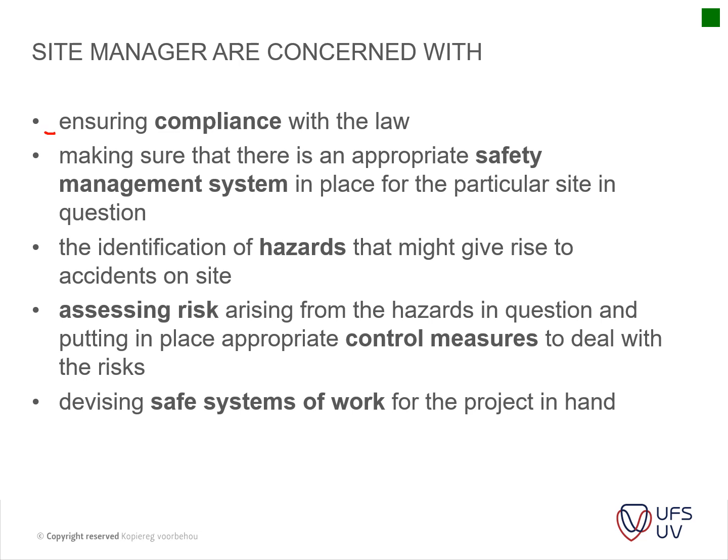Has everyone been cleared to actually do their work, especially if you do health and safety on mines? It can cause a lot of delays if, for instance, your workers have to go for induction training, which might take up to 2 weeks. So it's important that he's aware of all the compliances that are needed.